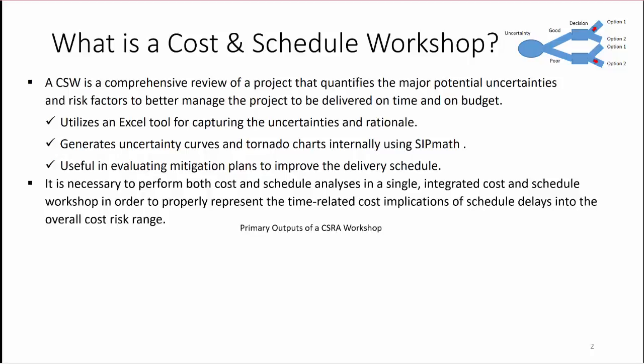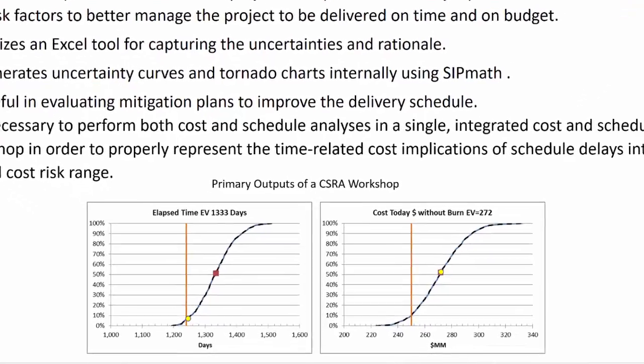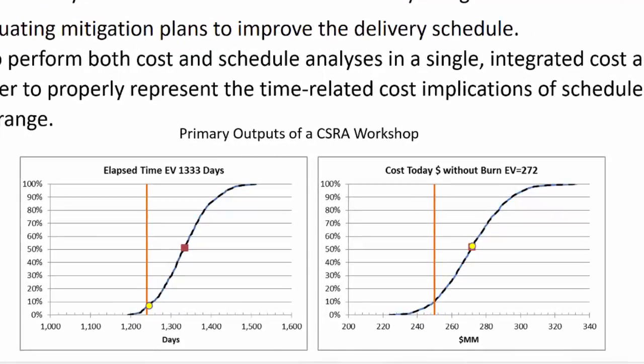So what are the primary outputs of a CSRA workshop? It's these two graphs. The one on the left shows the elapsed time for the project as a cumulative distribution function. The x-axis is in days, and the y-axis is the probability that you will achieve it in those days or less. Where the orange line is, it's saying there's only about 5% to 7% chance that you'll complete the project in less than 1,250 days. What's important about the orange line is that when you've generated a deterministic answer, it's probably down there at the P5 to P10 outcome — not at the red dot, which is the expected value.